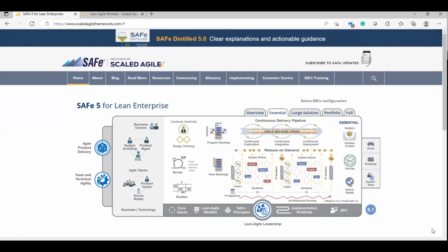Like that, Scaled Agile, if it is a complex and most complex project, we can use it. If it is easy, go to Scrum. If very, very easy, go to Waterfall. Even on the first day we learned the same in CSM, right? Complex projects use Scrum, non-complex projects use Waterfall. Scaled Agile is for a minimum of 50 members with a complex project. Otherwise, don't enter, because it's a waste of putting in that much energy.